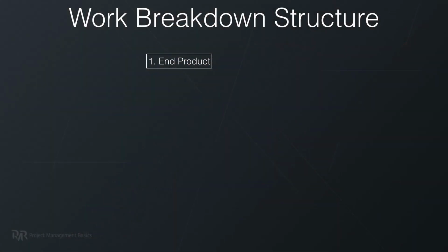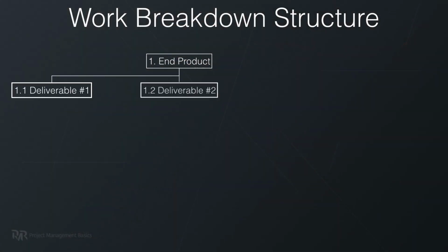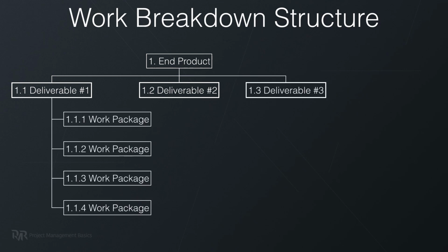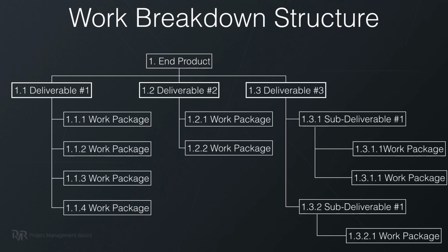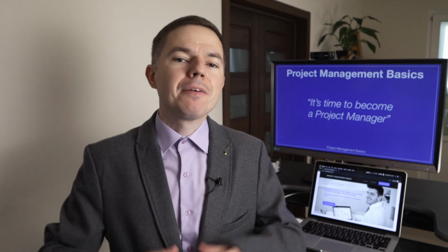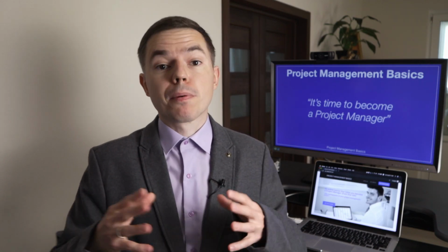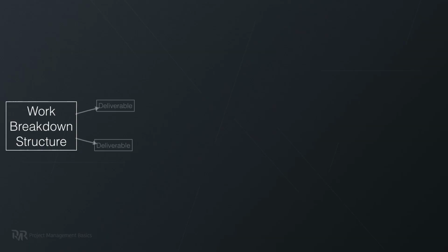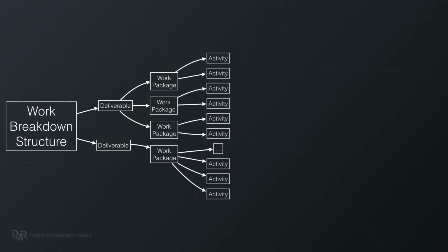You do all this prior work to ensure that you don't waste lots of effort on the next step. And the next step, you need to create a work breakdown structure. It takes a lot of effort from the whole project team and subject matter experts that you can reach. In the process, you decompose the deliverables from the project scope statement into smaller pieces. You need to describe all the parts you need to create to produce the final product, service or result. And then you break them down even further into activities and actual tasks.